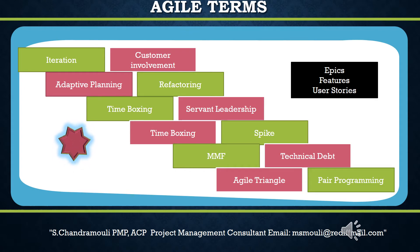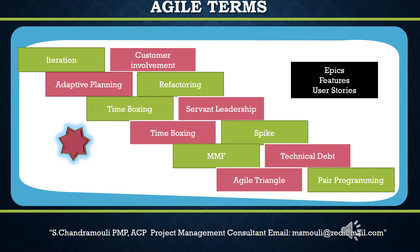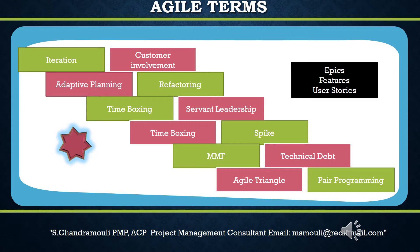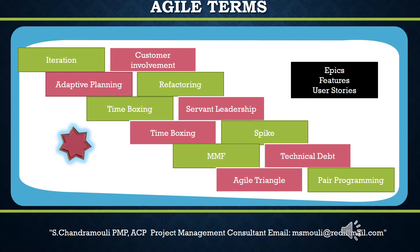Fourth, minimal marketable feature (MMF): MMF is the minimum feature set of the product so that people can start using it rather than waiting for all the features. There will be a release after minimal marketable features are created. It enables incremental delivery of the product. Multiple MMFs make the whole product, and each MMF has value to the end user on its own.